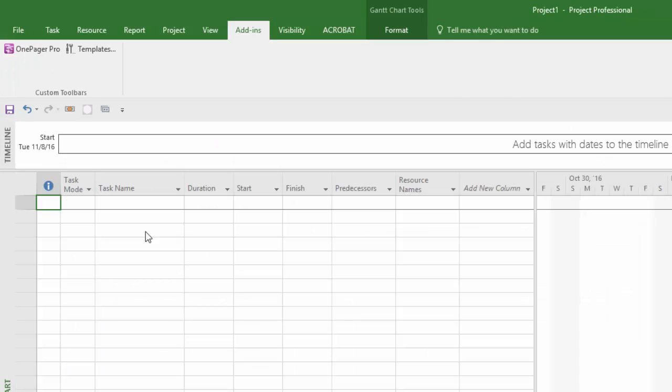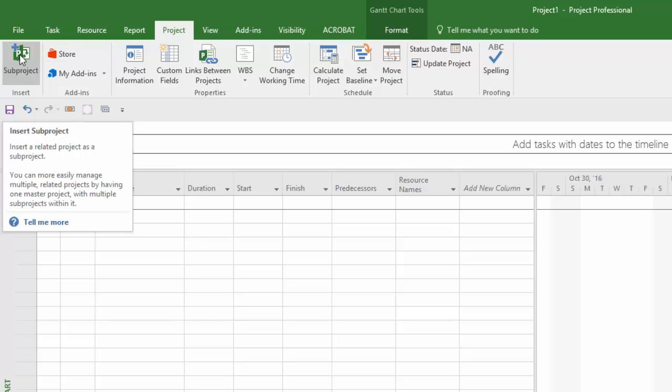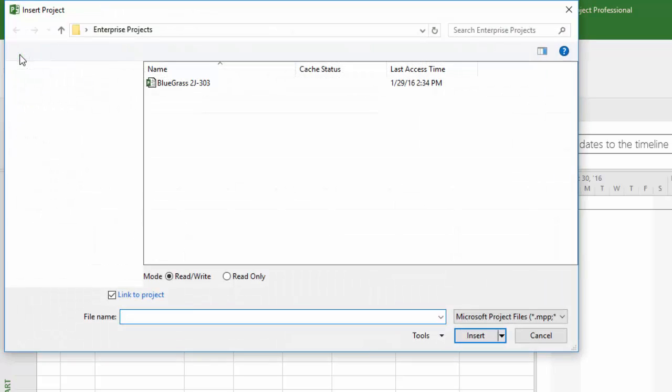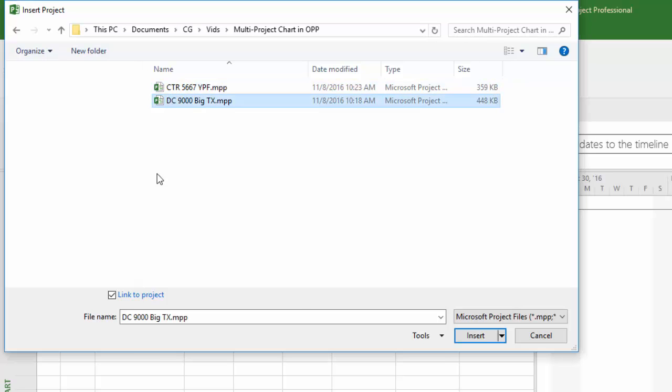Then navigate to the Project tab in Microsoft Project where you will find this Sub Project button on the left. When you click it, a Windows Explorer will pop up prompting you to choose a file you'd like to embed into your new master.